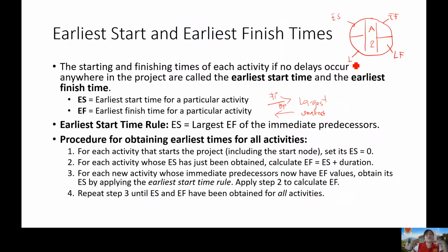Okay? Earliest start indicates the earliest time possible that the project can start. And your latest start is the time, for example, where the earliest start says 2 weeks, but here it says 3 weeks, week 3. That means I can still be delayed up to week 3 in that project. Earliest finish, this is with consideration to the processing time.